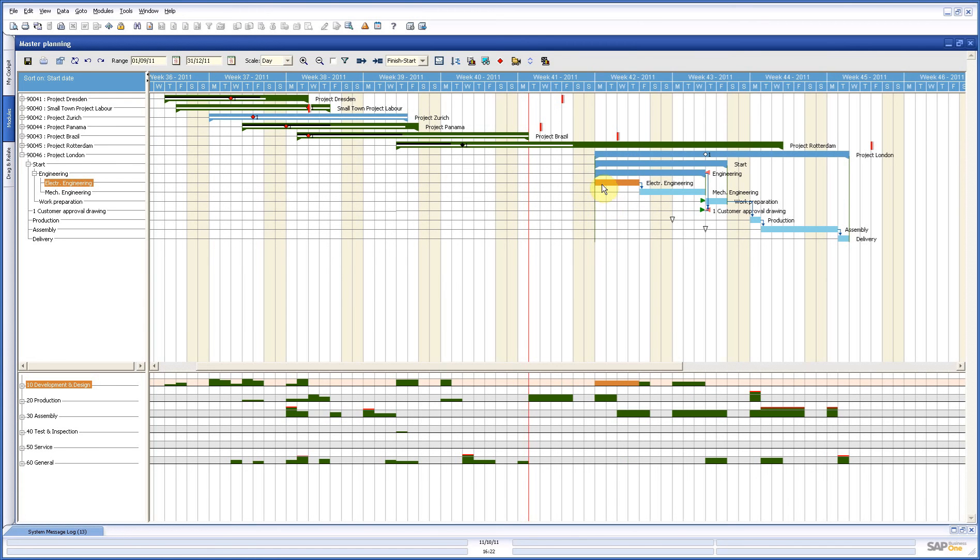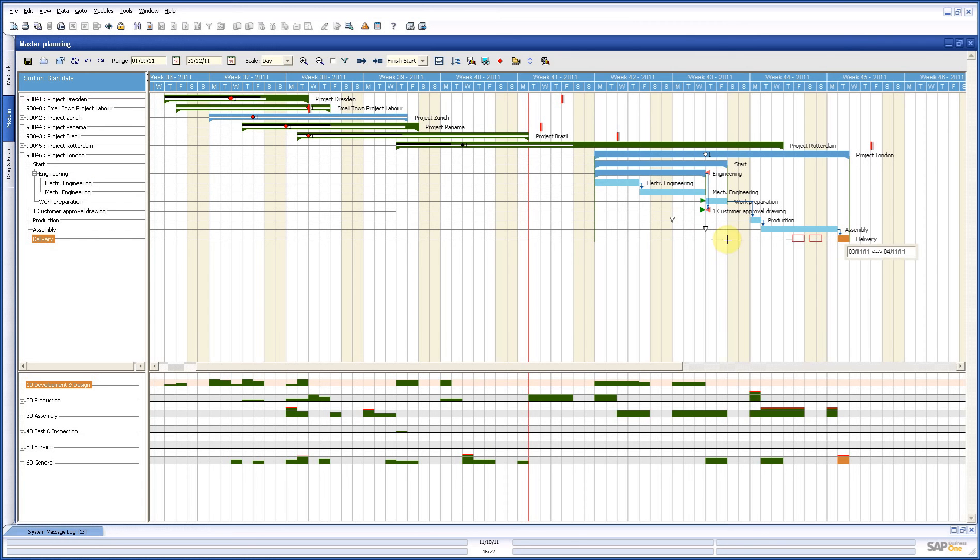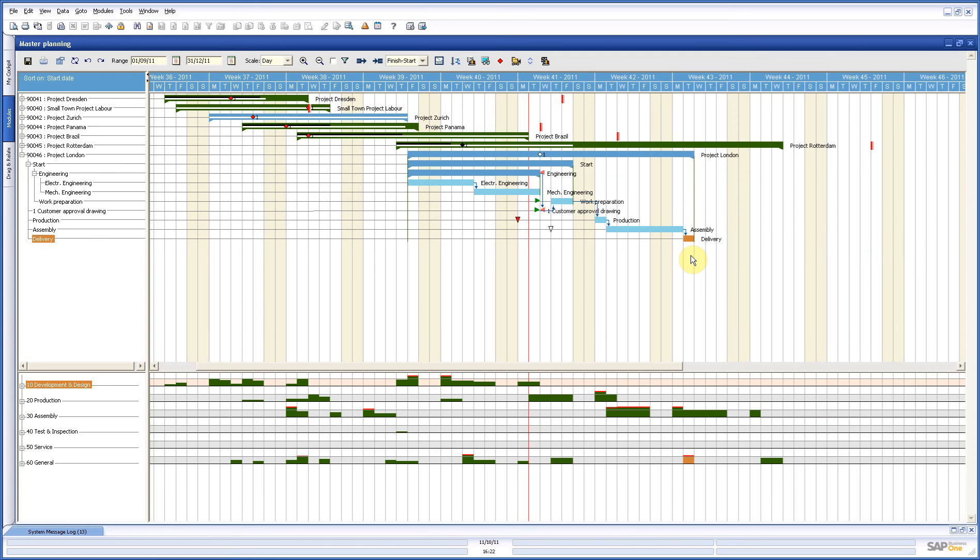We also have start-start and finish-finish constraints where activities have to start or finish at the same day. Now, how does it work? You have seen it already. I can also put it back. If I say I want to have my last activity started here, then everything, because of those constraints, is moved back.